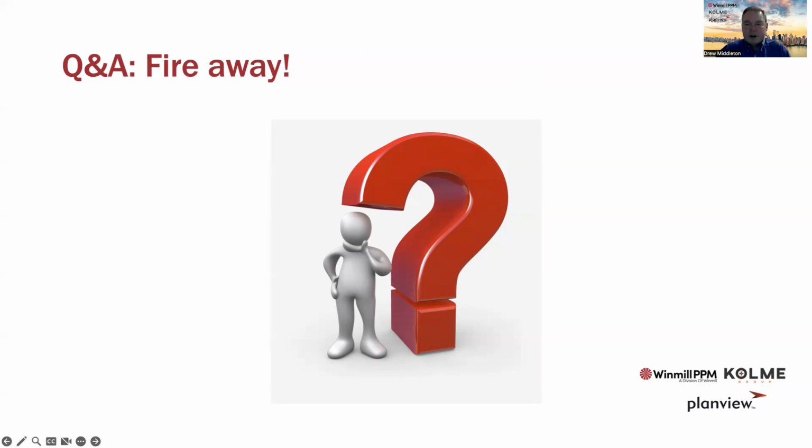I think the trick now is you probably should put a business case together. You can sort of outline, here's what we believe the benefits are. Here's how the executives are going to benefit from this, because they always want that with them. Here's how the organization as a whole is going to benefit. Perhaps you can do some measurement on the current projects. Are we successful in staying on schedule? Are we delivering the scope that we agreed to? Are we experiencing a high number of issues that we could have headed off when they were risks and not yet issues? If you can put all that together, you can then set some targets and say, this is what we believe a PPM is going to help us accomplish if we invest in it, if we put the right effort into doing it right.